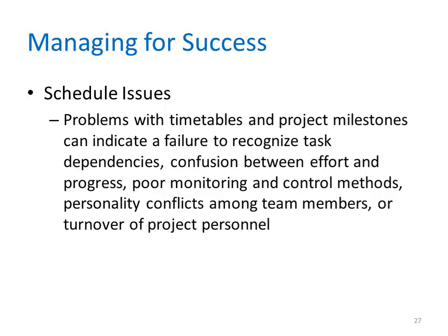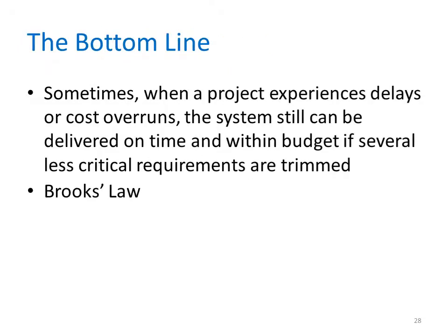Here are just a couple more thoughts on this slide concerning schedule issues and the problems that can result, again, if you didn't plan adequately and correctly to begin with. If a project is in trouble because of a lack of resources or organizational support, management might be willing to give the project more time, more commitment, a higher priority. Adding staff, however, will reduce the project's completion time only if the additional people can be integrated effectively into the development team. If the team members lack experience with certain aspects of the required technology, then temporary help might be obtained from IT consultants or part-time staff.